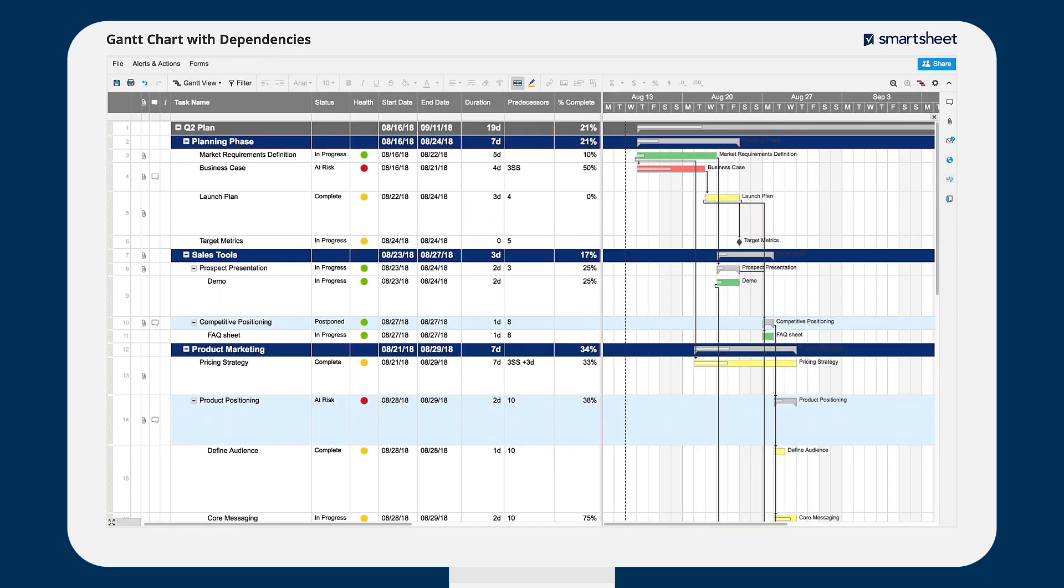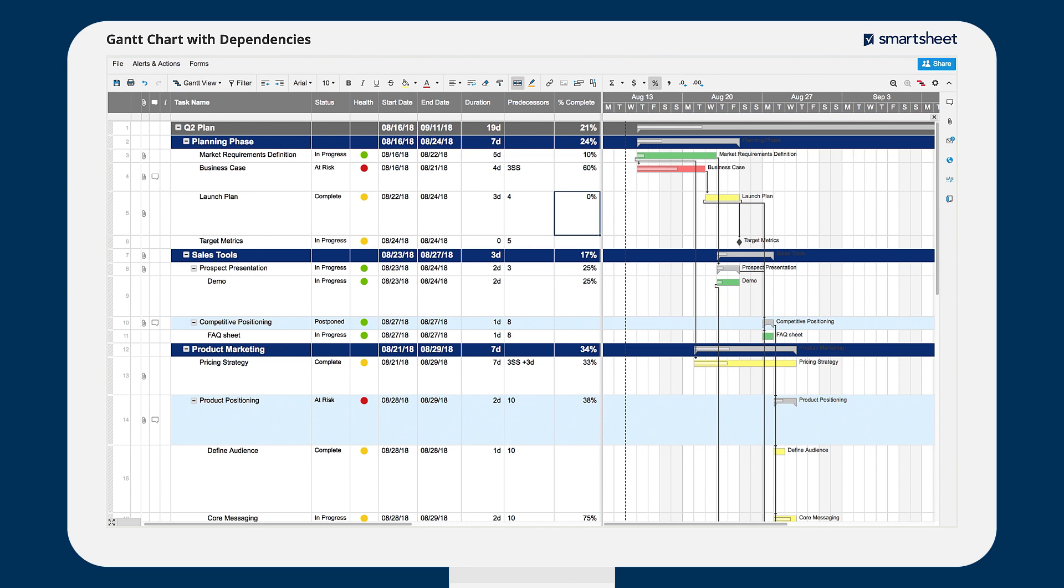Then the completion percentage of each task will visually display on your Gantt chart. Smartsheet automatically calculates percent complete of the parent task.